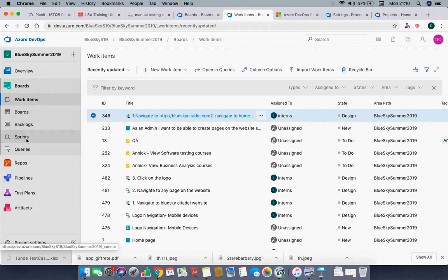There are different methods that people have used, depending on what your company decides to use. Some people work from the product backlog. Some people will create a sprint backlog and start to work on the sprint backlog. I've worked in some companies that use the sprint backlog: everything will be moved into the sprint backlog, and you create your tasks from the sprint. I've also worked in some companies where they use a swim lane on their backlog. They work on the product backlog, but with a swim lane separating the current sprint from the rest of the product backlog. Depending on what you decide to use, I'm going to go through the two methods right now.